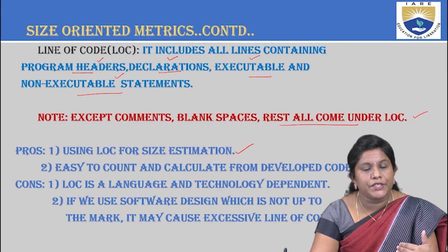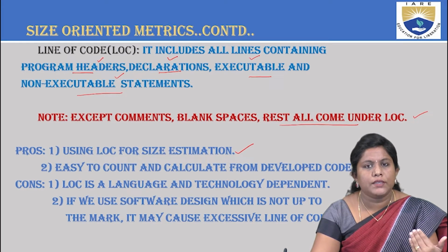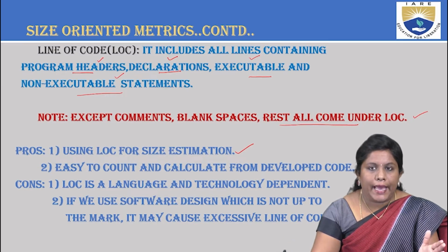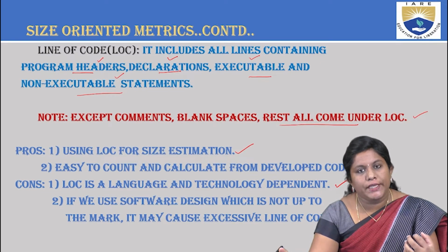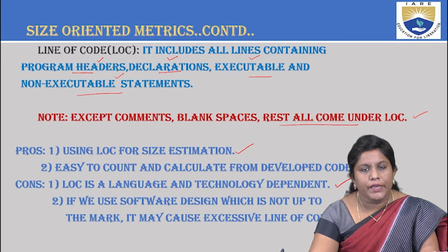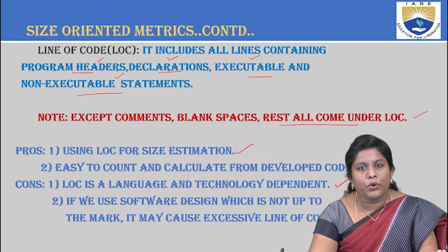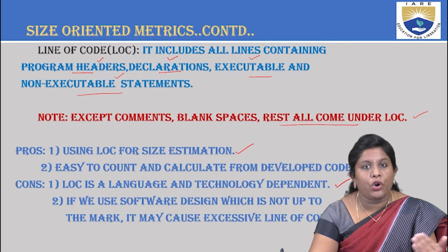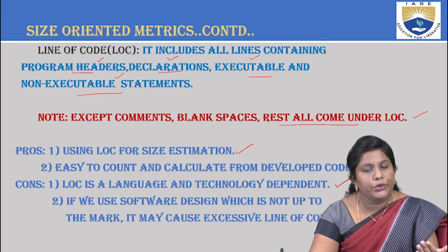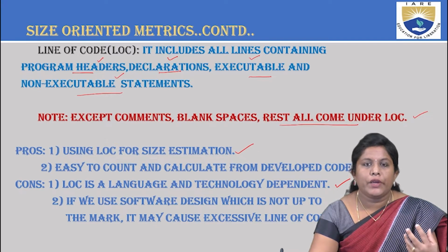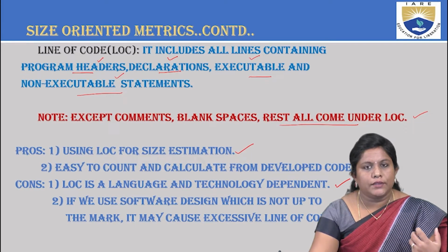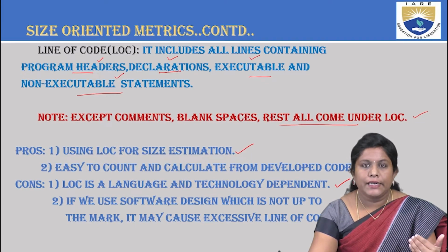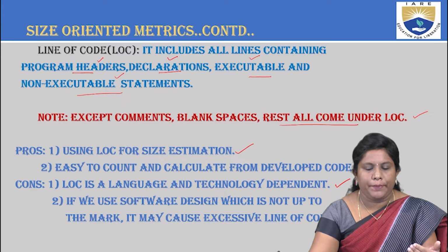And what are the disadvantages when you talk about size estimation or lines of code? It is nothing but that it is language and technology dependent. When you say LOC, it changes from language to language, right? When you take any programming language, they might have headers, they might not have headers. If you are not using such headers, you can remove some 4 to 5 lines at a stretch, which is reducing the length of the code. So that is a disadvantage: it is technology dependent.